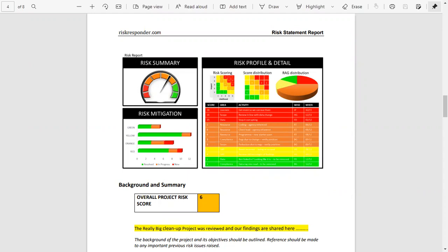We're thinking overall, what is the probability that we will come in on budget or not? You see, you would use EMV at the levels of a task or phase, but this is different. And you could actually use EMV at a project level, but this is different. This is really asking, what is the likelihood of us coming in on budget?